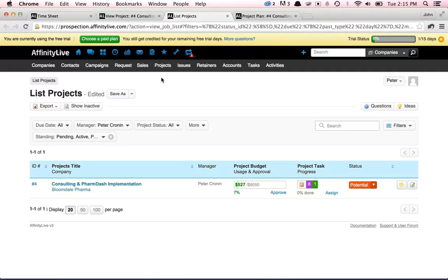And so we could potentially, just as an example, say we were doing a quarterly deliverable. Sometimes we just invoice quarterly, but sometimes we get paid up front. We've got to manage POs and all that sort of stuff. Is that stuff that you can do within the retainer part? For being paid up front, I would go through a project for down payments. So if you're looking at a 25 or 50% before a project commences, I would actually go through the project for that one since it's a one-time payment.